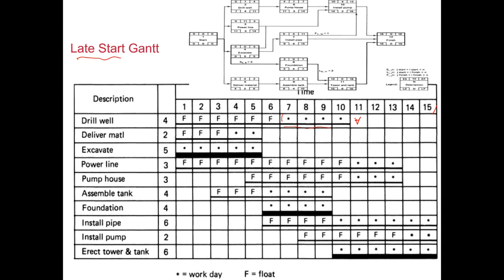So it is not a recommended method of scheduling your activities, because you are making your work and your project much more sensitive. Anyhow, it shows you the other extreme. One extreme is to schedule all the work based on early start timings, and the other extreme is to schedule it based on the late start timings.